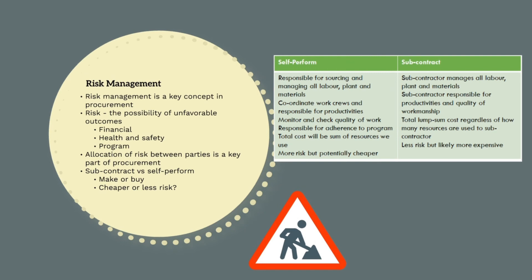One of the most effective ways we manage risk on a construction project is through procurement. Risk can be defined as the possibility of unfavourable outcomes, and risk management is a massive part of construction management — safety, environmental, quality, productivity and community issues, just to name a few. The way we allocate risk and responsibility between parties is a key part of procurement. For example, if we self-perform a package of works, we'd be responsible for sourcing all the labour, plant and materials, coordinating the work crews, and monitoring and controlling the quality of the works. We would hold the productivity, program, cost and quality risks.